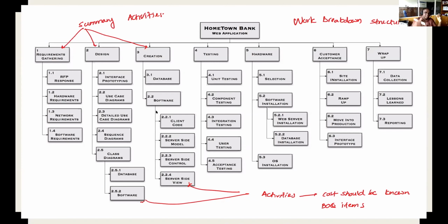Now, this structure is there in the BOQ. If it is floor wise, ground floor, you have columns, concreting, those things. Right. So the addition of this lowest level should give us the BOQ values. The cost of these lowest level items, if you have the BOQ, right, you have this B111, something like that. The lowest level should be activities. So B is your summary activity. B1, you have different activity like that. If you have a BOQ, that structure is there normally.